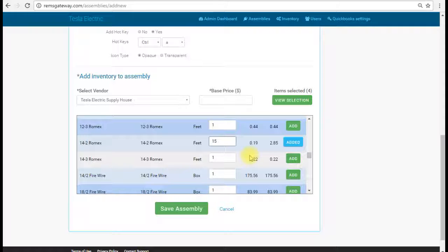And if your guys are conservative with wire, or if they're a little liberal with wire, it's all going to be based on when you do that pull sheet, how close is it getting for you, and do you need to tweak them a little bit to get them closer. But rule of thumb, I normally use for receptacles about 15 to 20 feet. And then for circuits back to a panel, I normally use between 85 to 115, depending on what I feel most circuits take to get back. But like I said, it's really just going to deal with what you feel comfortable with.